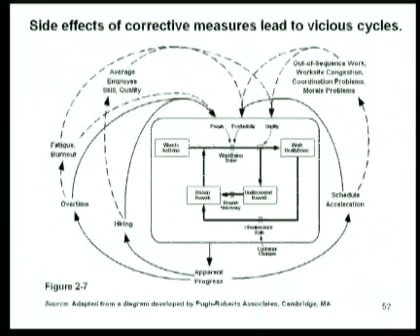There's also the notion of the external dimension. Side effects for these corrective measures, they led to very vicious cycles. The workforce at Ingalls was really stressed out. They required a lot of overtime. Overtime led to fatigue and burnout. There was a lot of hiring that needed to be done in order to make up for lost work, so that the skill level actually declined because the people they hired were not as skilled as the ones they needed.